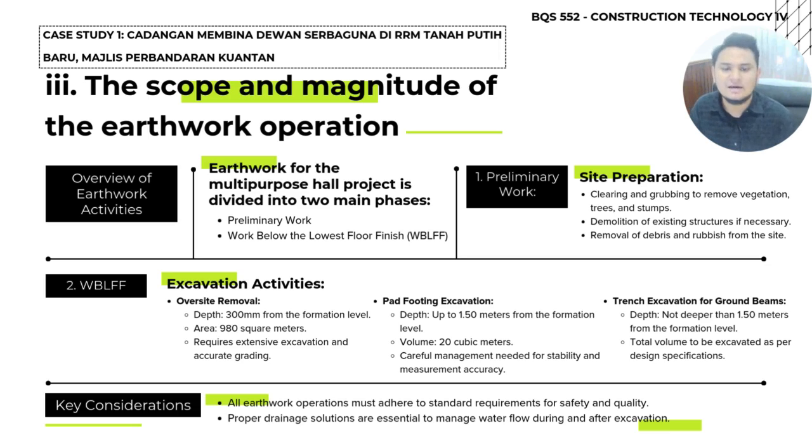So first, preliminary work. For the site preparation, we are clearing and grubbing to remove vegetation, trees, and stump. Second, we demolish the existing structure if necessary. And last, removal of debris and rubbish from the site. So second is WBLFF. For WBLFF, we have the excavation activities.